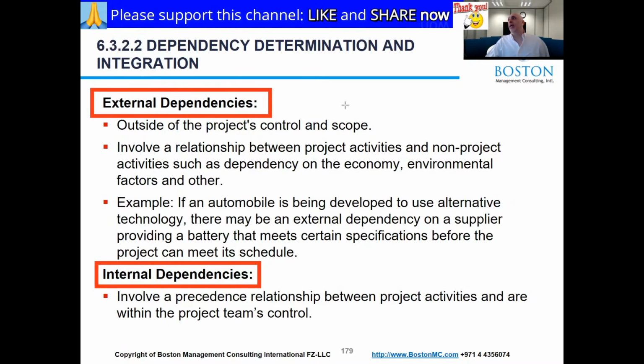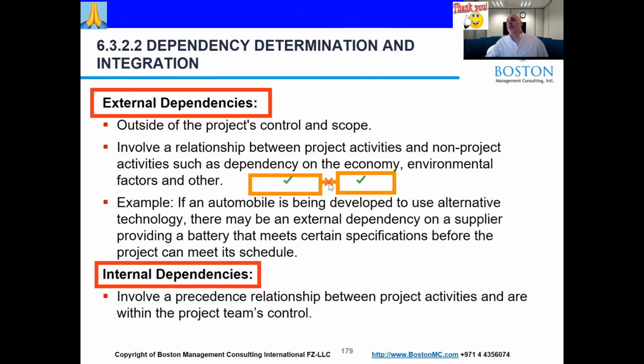So just because you have two activities that appear to be back to back like this, there is no guarantee that when one of them is finished, you can expect that these will go in a specific order, and that the moment this one is complete, that one would also start. There's no guarantee that there would not be a problem that prevents you in the middle here from starting on the next activity. What if management did not get a certain permit in time? That would prevent the next activity. So just because they look like they're back to back, there's no guarantee that that's actually going to happen.